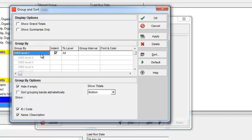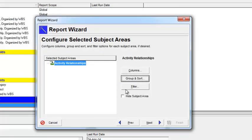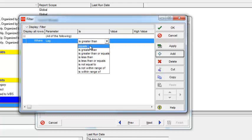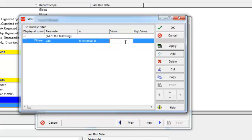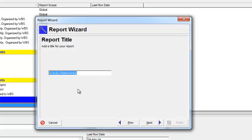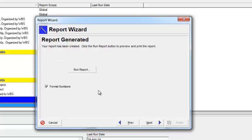From the Group and Sort, you can select how you want to group and sort. I want this report grouped by WBS. Click Apply and OK. Now here is the tricky method: from the Filter, select the filter where Lag is not equal to zero. This report will give you the relationship lag of only those activities that have a lag greater than or less than zero.